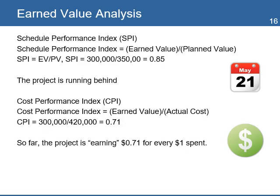Another way to determine the performance variances is by calculating the Schedule Performance Index. The value of SPI for the example is 0.85. A value less than 1 means that the project is running behind schedule. You can also calculate the Cost Performance Index, CPI. The value of CPI is 0.71. A value less than 1 means that the project has a budget overrun — it is only earning $0.71 for every dollar spent to date.